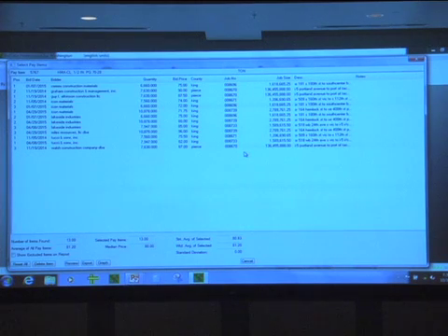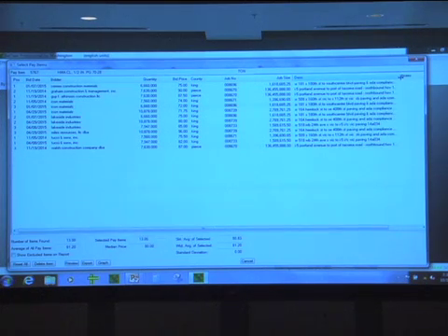So the first thing I like to do is I like to go out here and look at my contractors. Now, do I have a signals guy out here? If I have a signals guy associated with this HMA item I'm looking at, I'm going to toss all those prices out right away probably, because he's going to sub that work out, so it's going to cost more. Another thing I'm going to do is I'm going to go look over here at the contracts it was used in. And you know, we all know those contracts that had all kinds of problems and all kinds of issues and just strange work going on in them. So I'll probably throw those costs out as well.